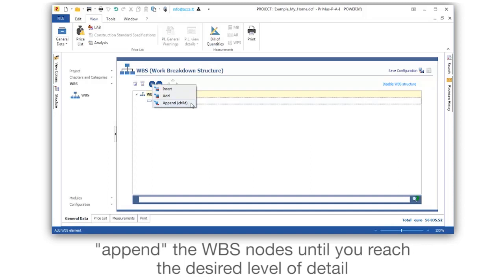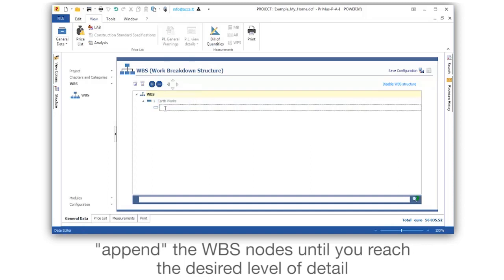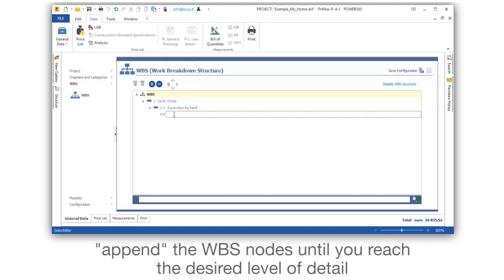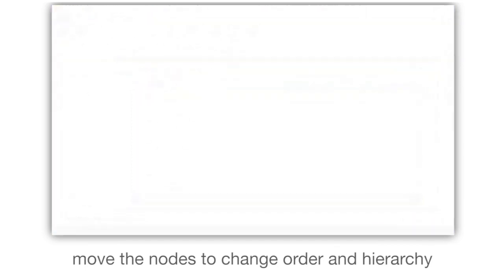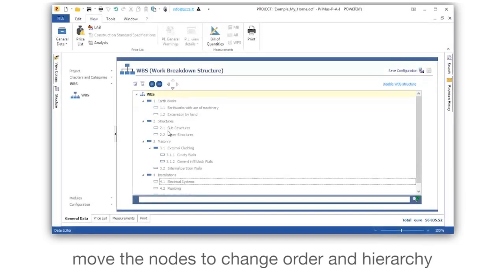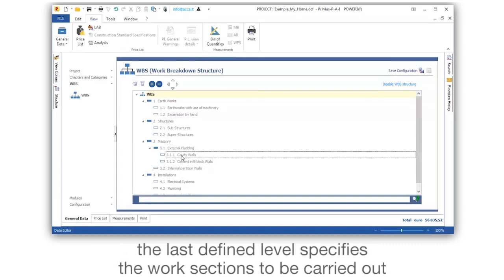Append the WBS nodes until you reach the desired level of detail. Move the nodes to change order and hierarchy. The last defined level specifies the work sections to be carried out.